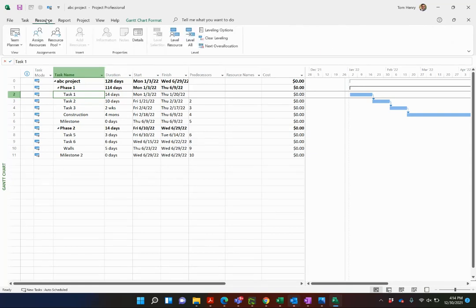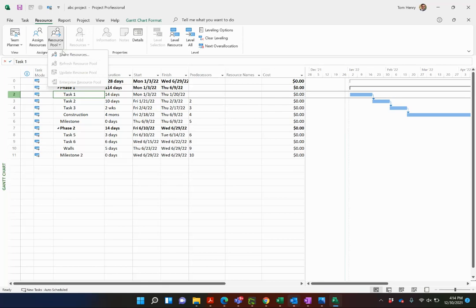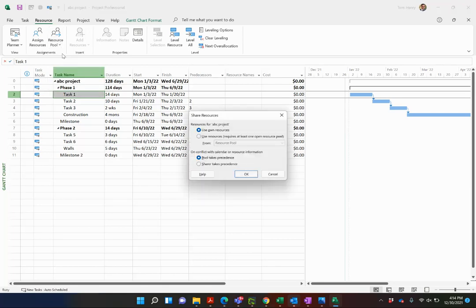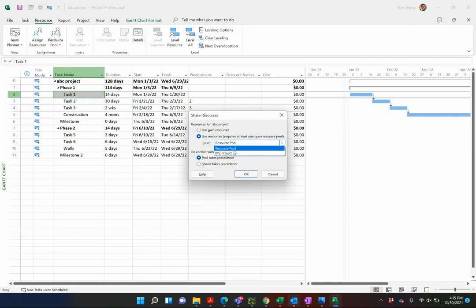To do that, resource ribbon, resource pool, share resources, use resources from, and I'm going to use my resource pool project.